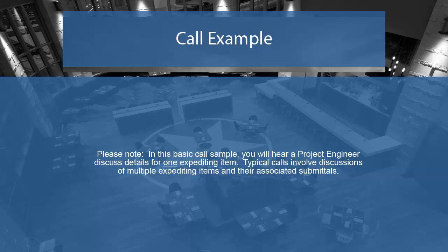Let me also ask, when can I expect all of your other submittals, like mixed designs, admixtures, things like that? Yeah, I was just looking at our contract and it gives us 2 weeks for that, but I think I can get them to you by the beginning of next week. Is that going to work for you? I think that'll work just fine. Let me ask you, who do you guys get your rebar from? Oh, we're getting it from Arkansas Steel Reinforcing. Okay. Do you mind sending me the contact information for your point of contact over there? It is our policy to get contact information for any material that has a lead time over 2 weeks. Sure, I'll send that information with the submittals if that's okay.